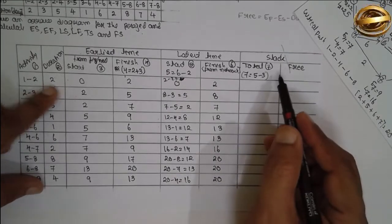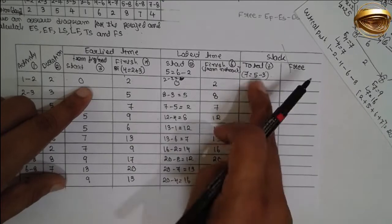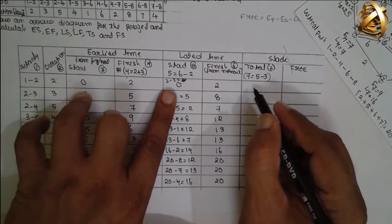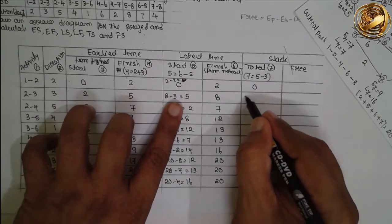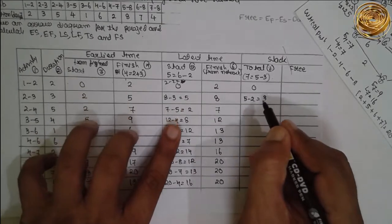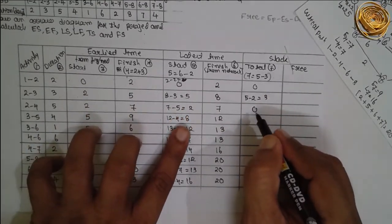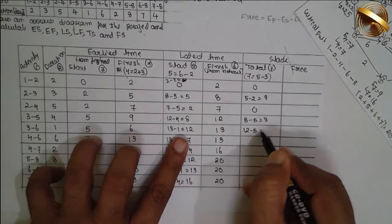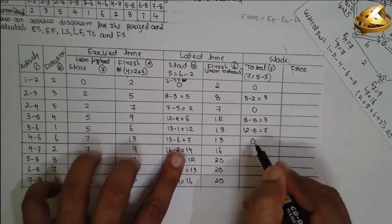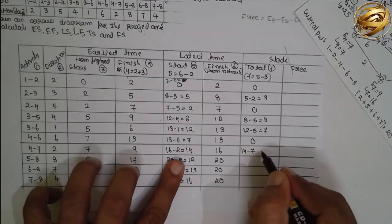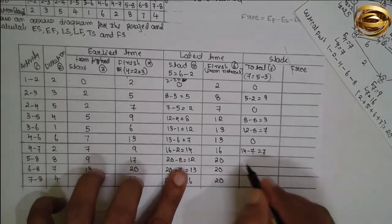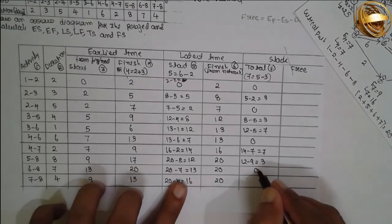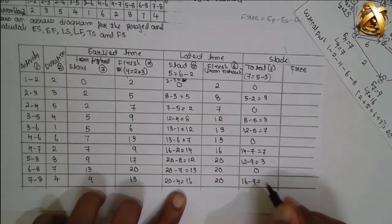Total slack equals latest finish minus earliest finish, or equivalently latest start minus earliest start. Values: 0, 3, 0, 3, 7, 0, 7, 3, 0, 7. Activities on the critical path have total slack of zero.